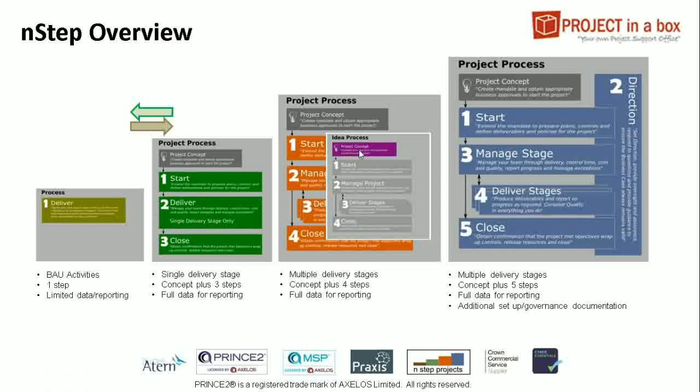So you get a slightly expanded concept phase with some idea documentation, allowing you to document the proposed project, and then a hard gate, and the project cannot progress into delivery until it's been signed off and sanctioned by the organisation. Once that has happened, you then fall into the traditional 4-step method with all of its standard documentation available.